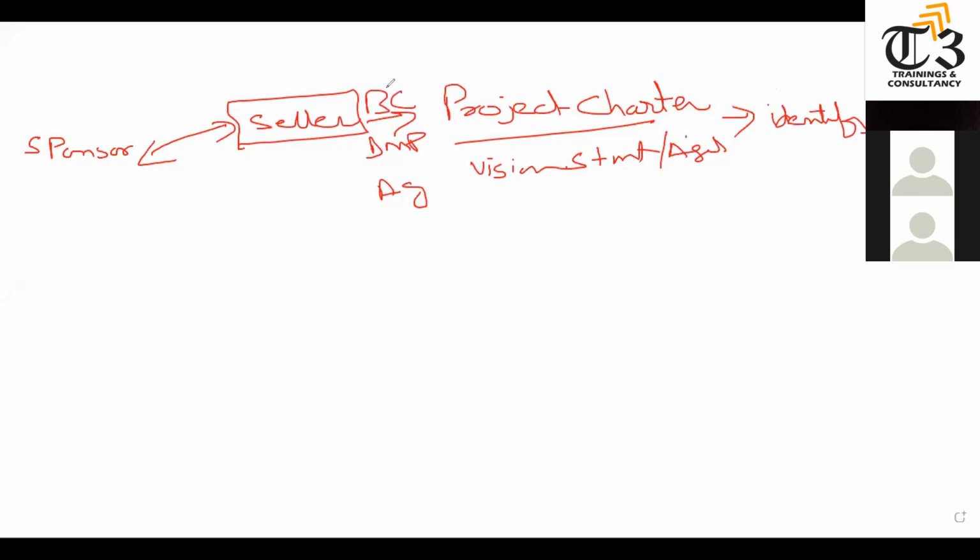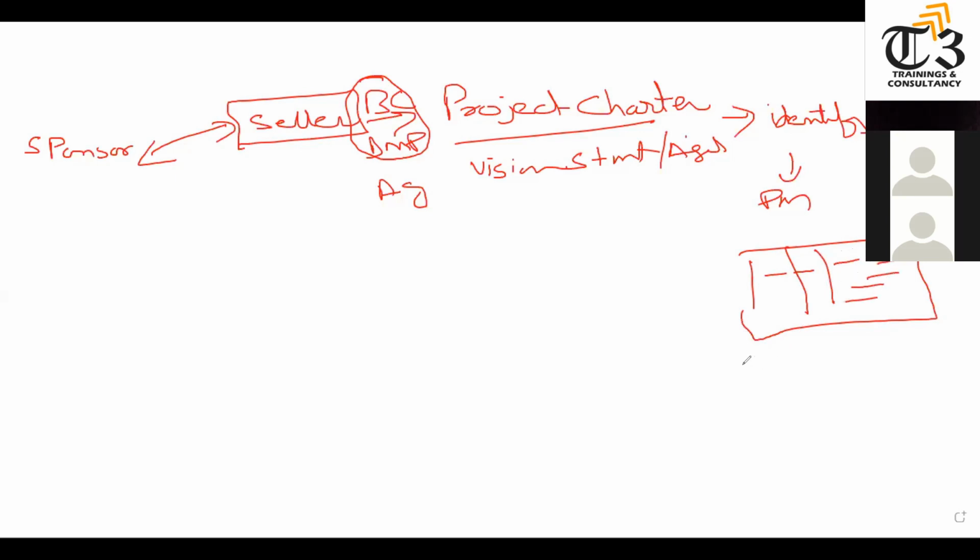Although the business analysts have already identified the stakeholders, as a project manager you will do it again and create the stakeholder register, which means you will have their names and their classifications. Classification means they are unaware, resistant, neutral, or supportive. So you will look at their current engagement and plan stakeholder engagement, how to keep them engaged, by using the stakeholder cube, which is like this: keep informed, keep engaged, keep closely informed, and keep closely engaged.